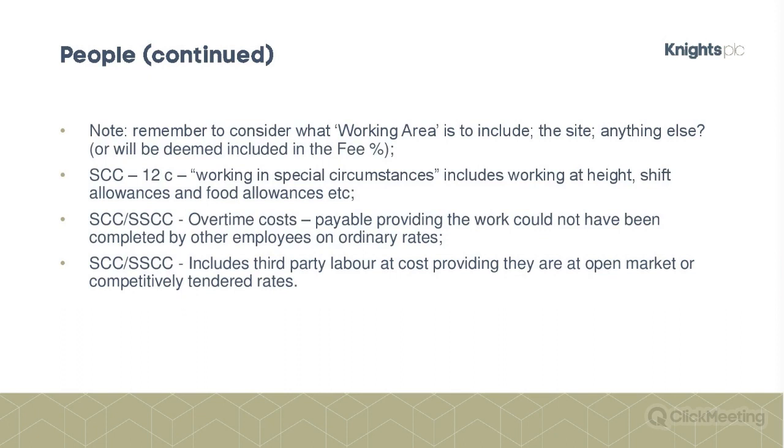So overtime costs are payable if they relate, for contracts A and B, to the compensation event, and for C, D and E if they relate to the work generally being carried out.